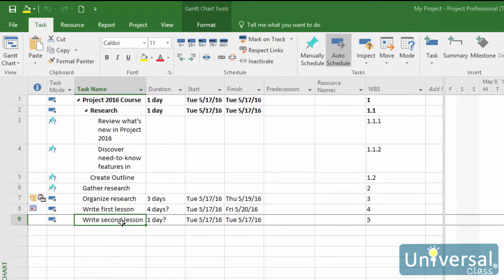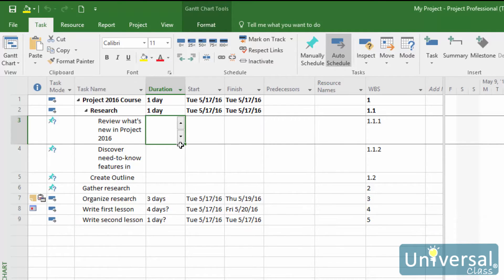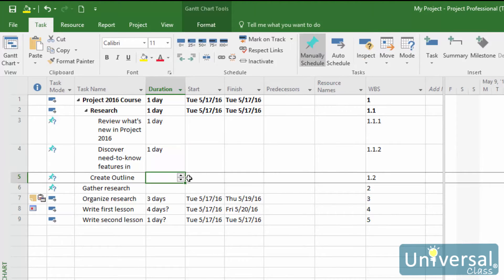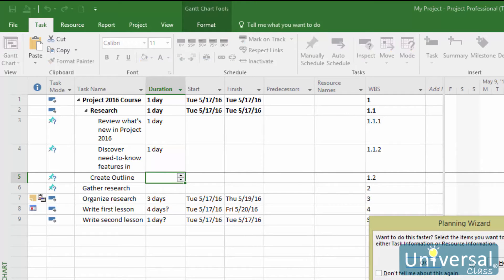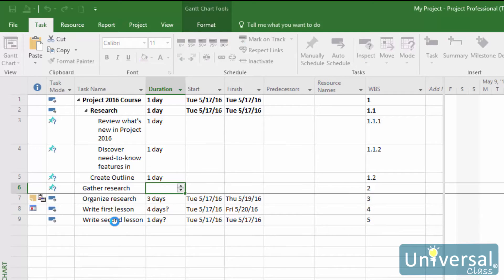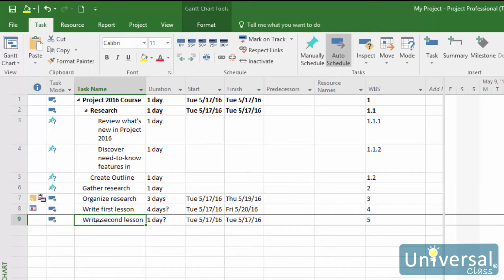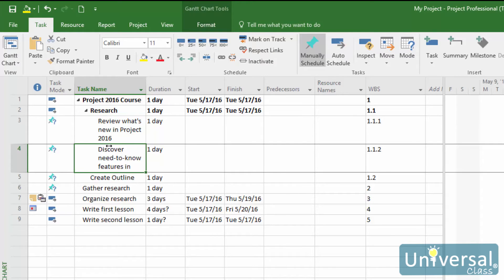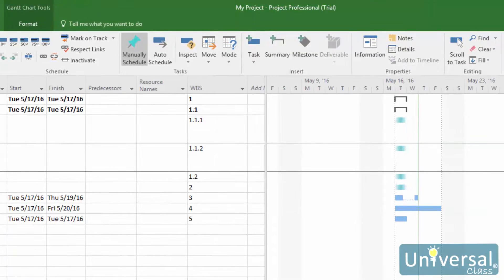Let's learn how to create a finish-to-start dependency. First, let's enter the duration for some of these tasks. Make sure you're in Gantt chart view, and that the two tasks you want to link are both visible. Now do a control-click and drag the predecessor's task bar — the blue bar — to the successor's task bar.